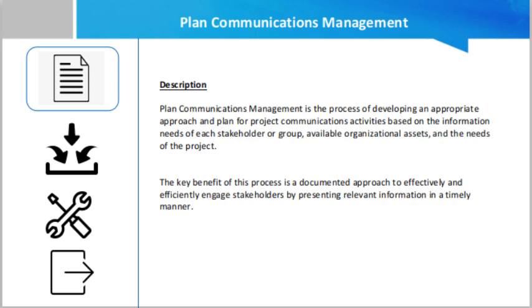Friend, plan communication management is the process of developing an appropriate approach and plan for project communication activities based on the information needs of each stakeholder or group, available organizational assets, and the needs of the project. The key benefit of this process is a documented approach to effectively and efficiently engage stakeholders by presenting relevant information in a timely manner. An effective communication engagement plan that recognizes the diverse information needs of the project stakeholders is developed early in the project lifecycle.